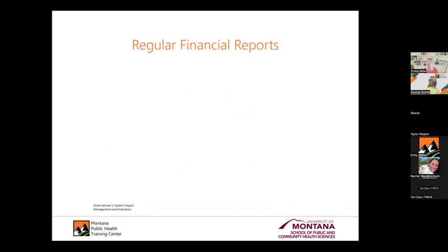The other thing is you want to have regular financial reports, because as the manager of the project, you are required to have these kinds of reports that keep up with the current balance in the grant account, the balances in those budget line items, and the expenditures since the last report. So you really want to do this over the lifetime of your program or your project. How often you do this depends on the requirements, but I would for sure say monthly. Okay, you want to do this at least once a month. You also do have a monthly financial report template in that packet, in that handout. It is called the monthly financial report.